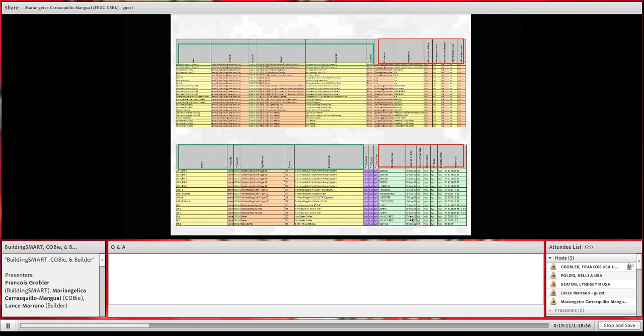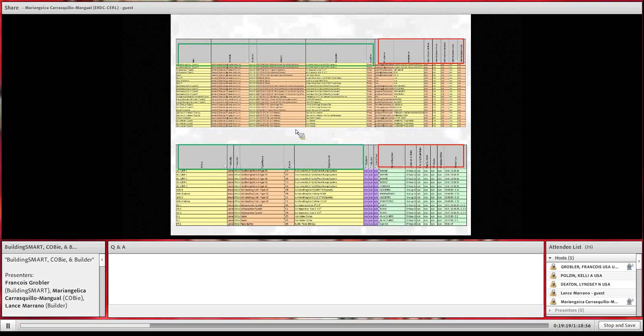We have the serial numbers, the installation dates, and we added the reference as the spec section here for each of the pieces of equipment. And as I say, I'm providing them a small template for each of the stages so we can collect all that information. The way this was done right now was manually. I merged the information that he gave me into their model.